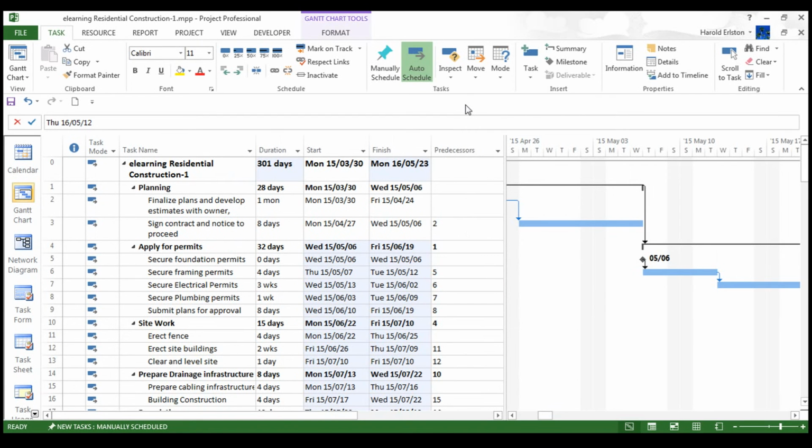In the last module, we spoke about tasks, how to set up the tasks, subtasks, and link them together. Now I'm going to show you how to go in and set up a recurring task. Now, a recurring task basically is something that happens on a regular basis. Example, a Monday morning meeting, and that's what we're going to set up now. For the duration of the project, we'll need to have meetings to discuss how the project is doing, etc., with the rest of the team. So what we're going to do now is go and set up those meetings and make it a part of our actual project plan.